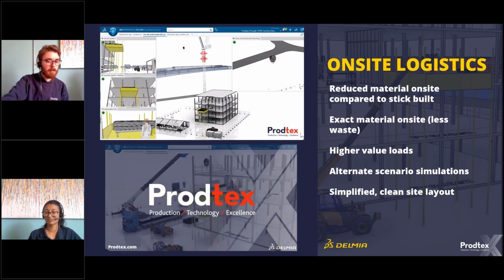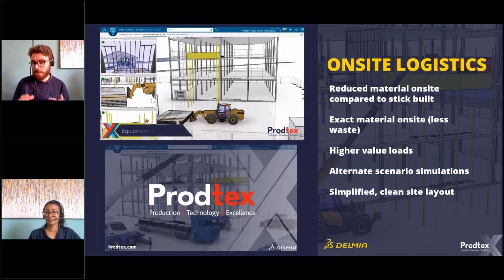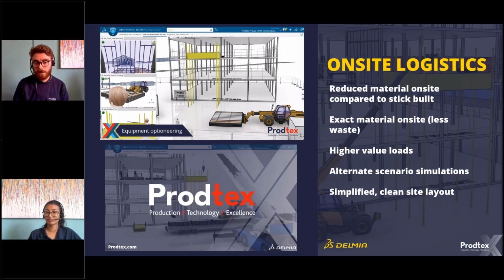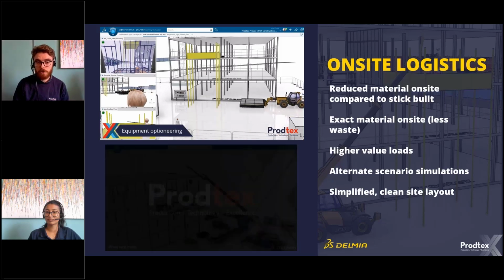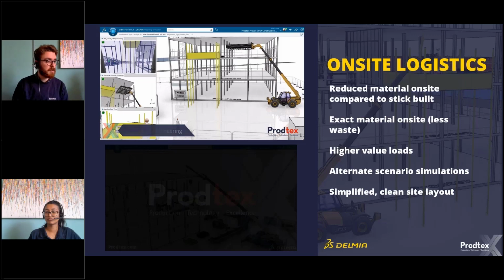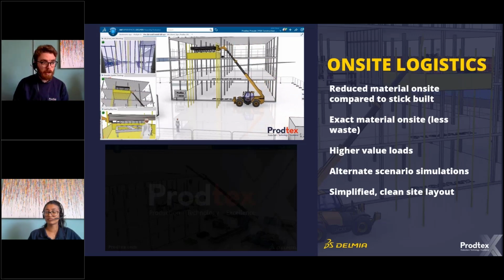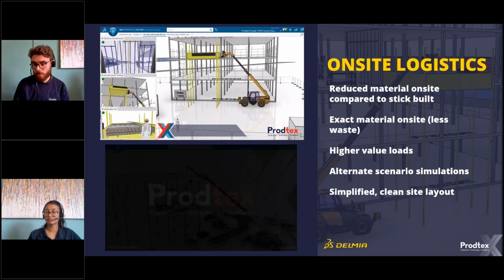But the issue being, if I play that simulation again on the top left, you can see when this thing actually loads into that bay, it's tight. And the driver can't really see what they're doing. So again, looking at safety, on the top left two screens, you can see different views of different spotters and the driver. So there are a lot of blind spots in there. You can see it's actually clashing with the loading bay.